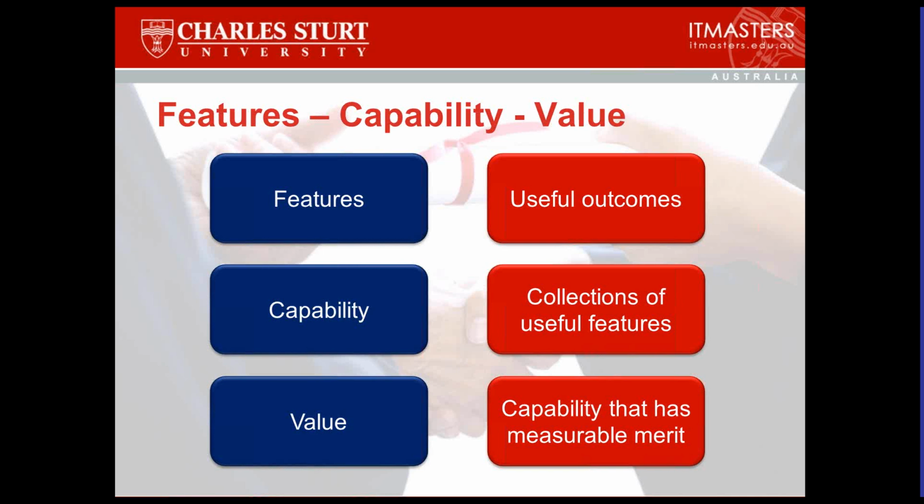If they are someone who doesn't and might not be expected to know how to exactly function as a team member in an Agile context, then you can have a chaperone. And I've used this method successfully a couple of times, where you've had external experts where you don't burden them with the responsibility of methodology. An external person who has a chaperone is essentially hooked up with someone as their main point of liaison and flow. Now, that doesn't mean that they pass all their information on to that one person and that one person is responsible. No, it's not what I'm saying. I'm saying they are a mini Scrum Master for that particular resource, or maybe for a couple of resources.